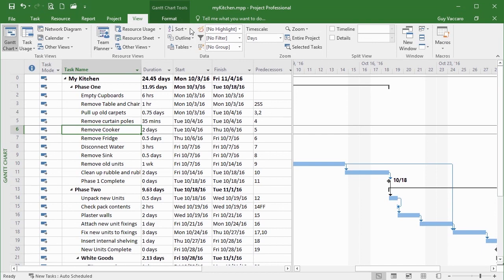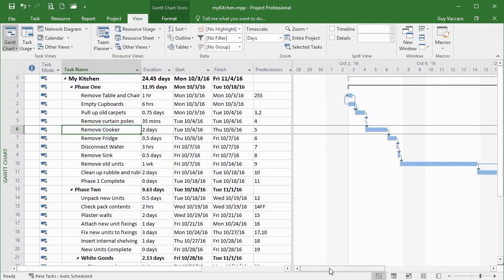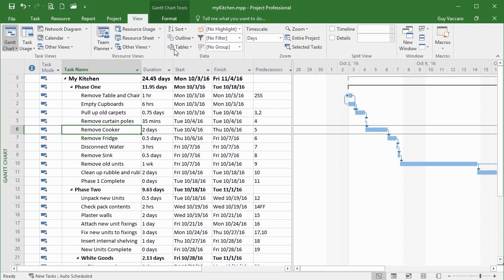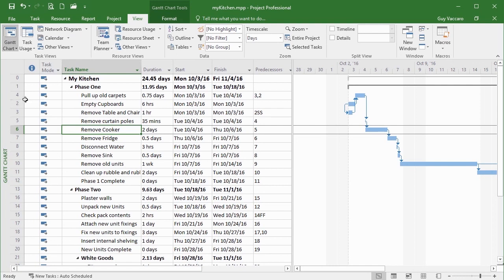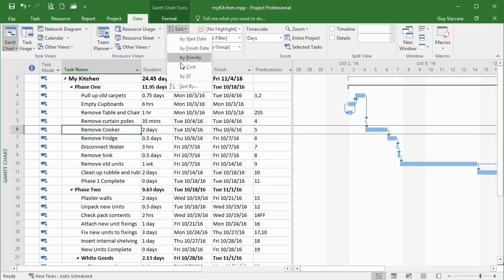If we change that to finish date, there is a little bit of a change — these two swap order and we can see task three comes before task two. They also swap their location in the Gantt chart, so the arrows start to get a little bit out of order. If we then go for priority, things change dramatically: task four comes up above two and three, and 'Pull Up Old Carpets' becomes higher in the list. The arrows tend to look a little out of order, but not too bad. To put everything back, simply go back to Sort and choose By ID.